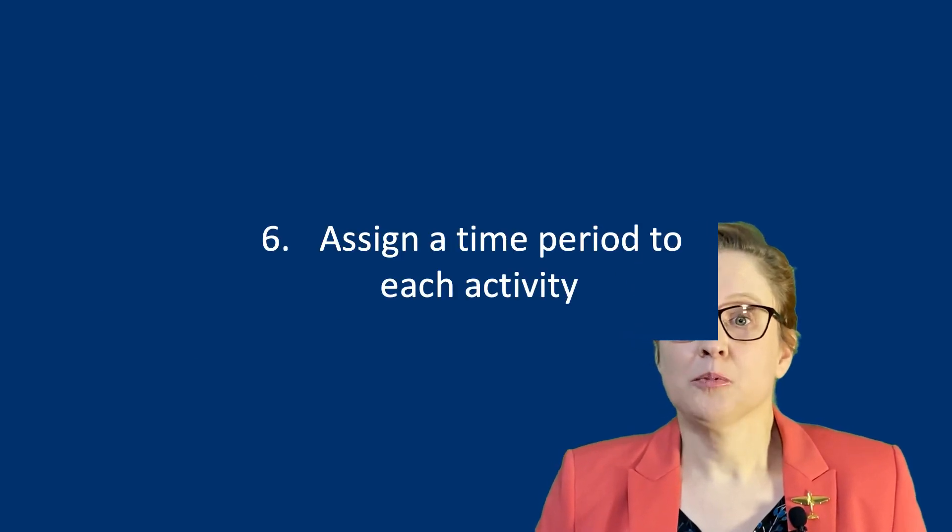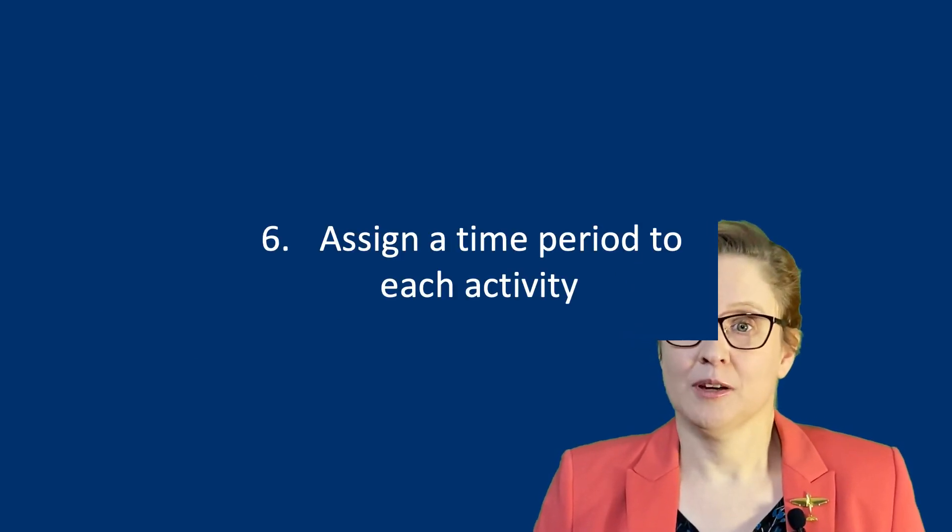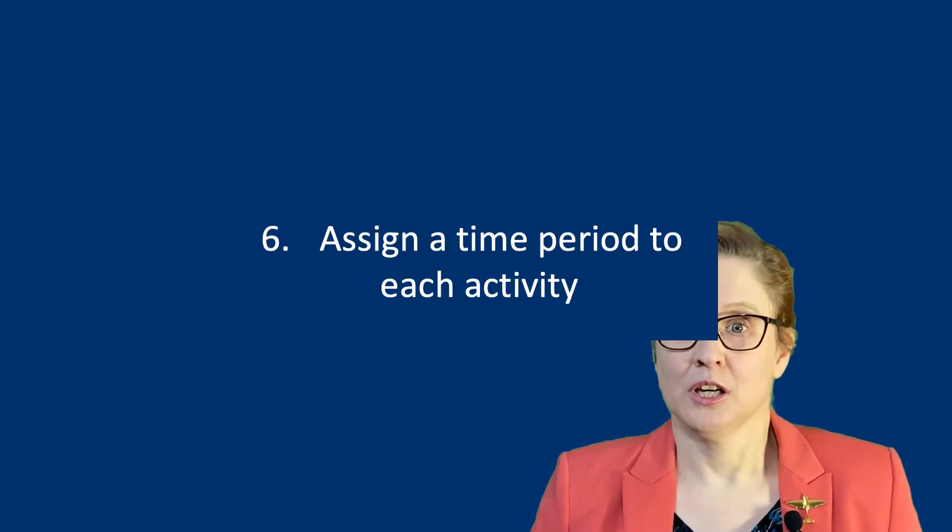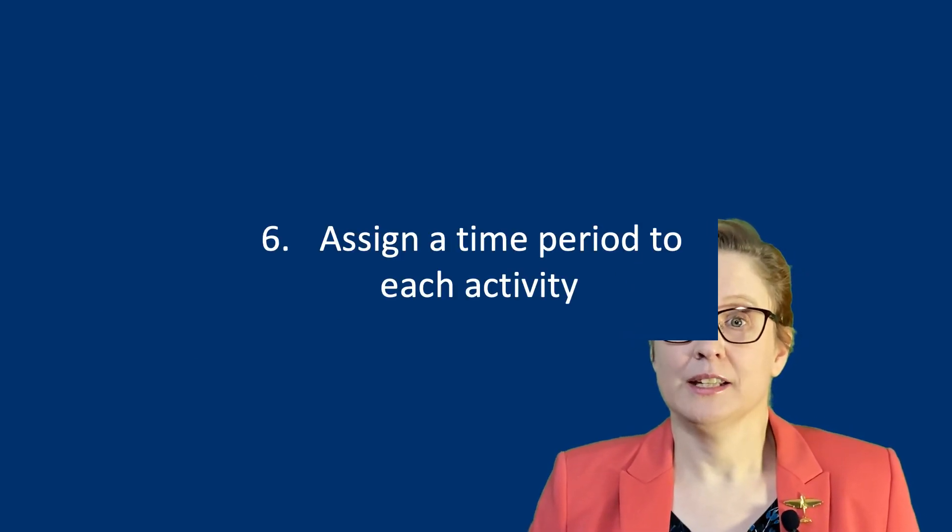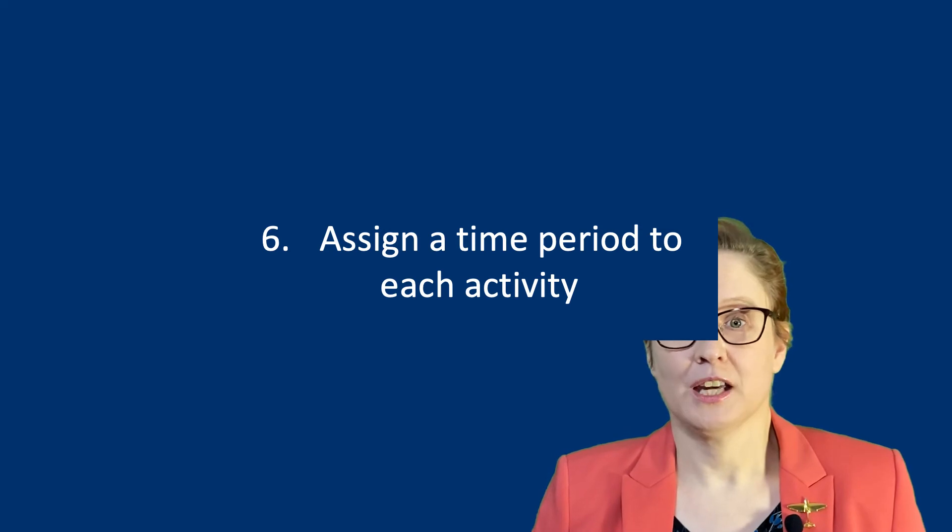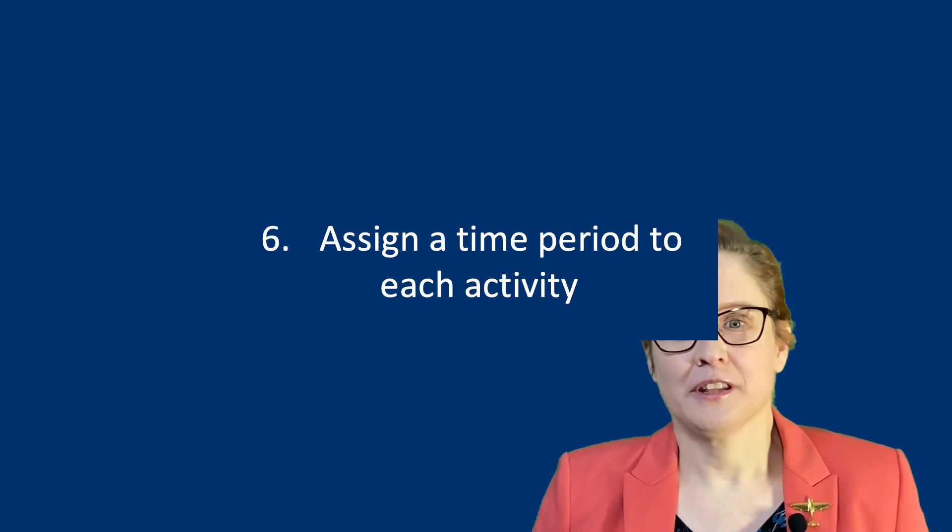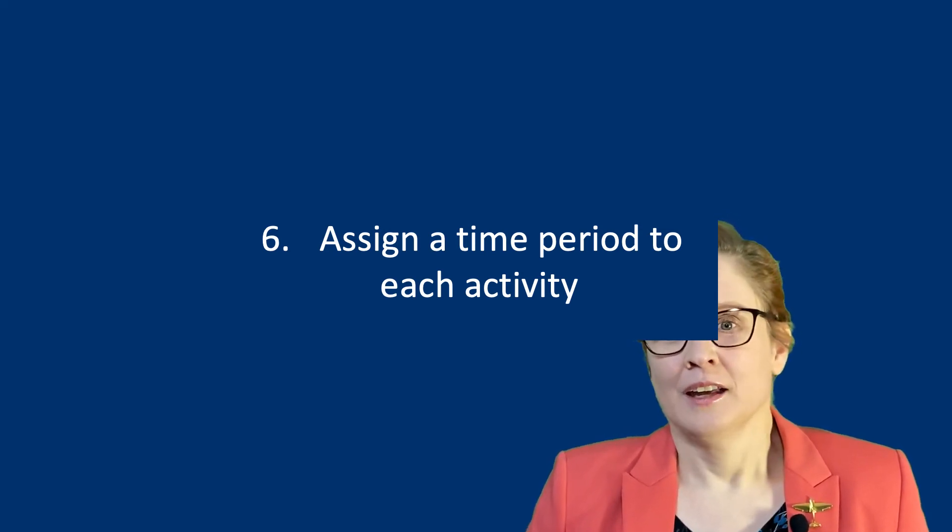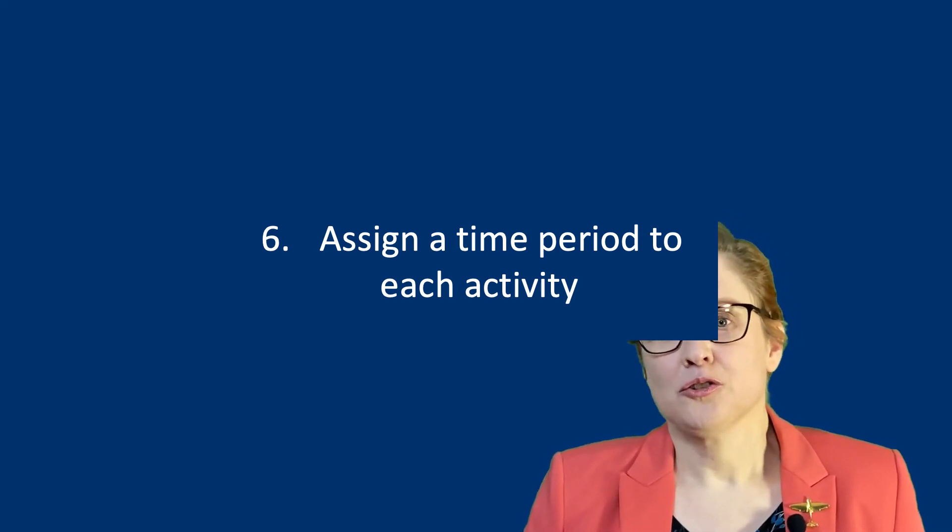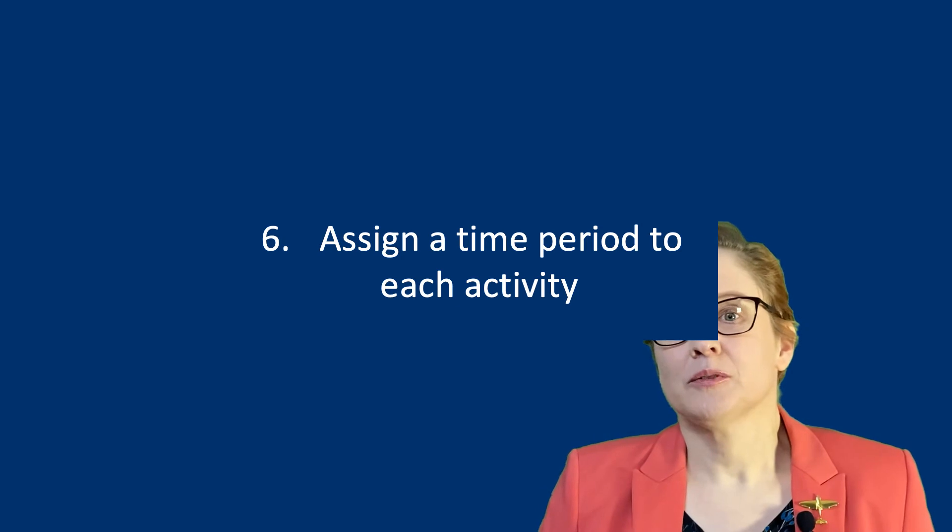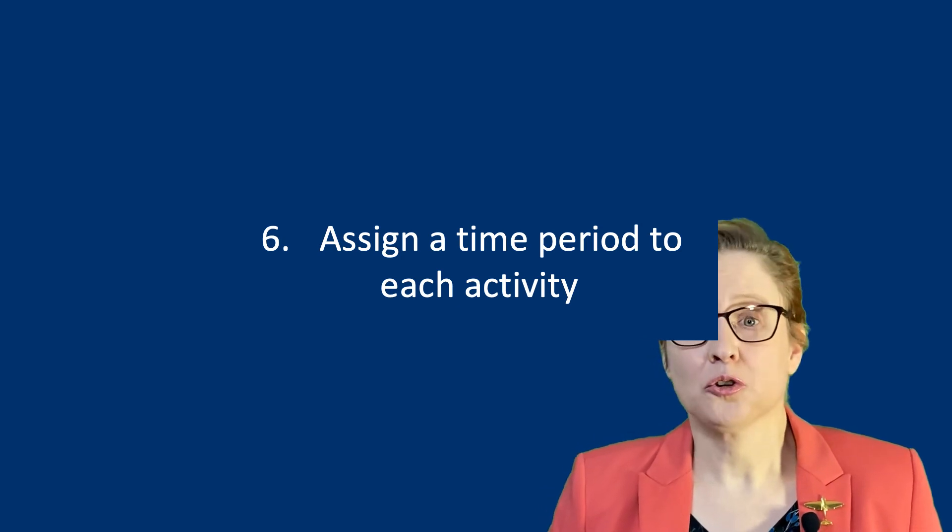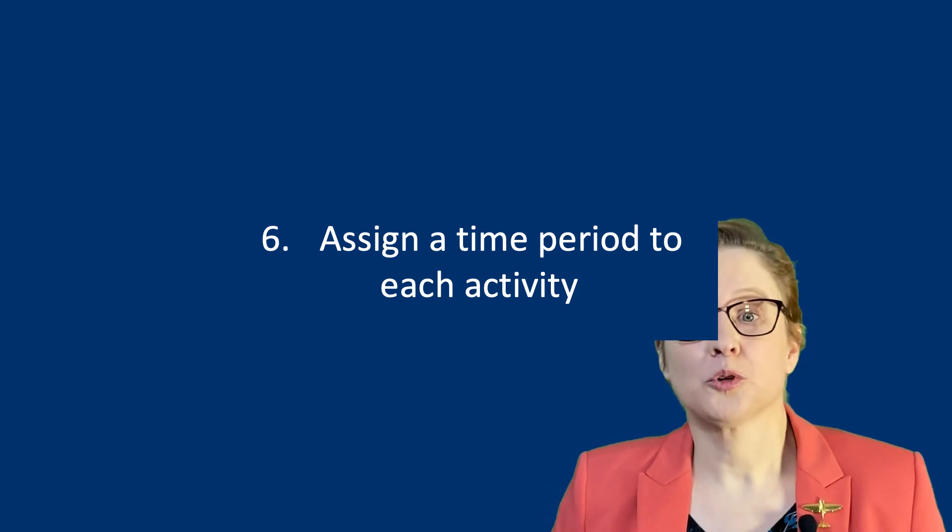Now, assign an appropriate amount of time to each activity. Do it at least at the level of days. Don't zoom in any further than that. If you are unsure how long an activity will last, ask your colleagues or other more experienced researchers.